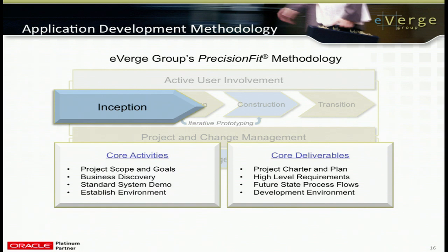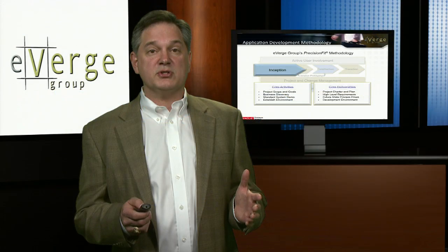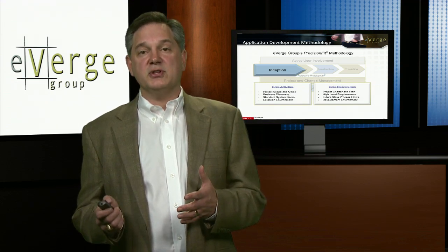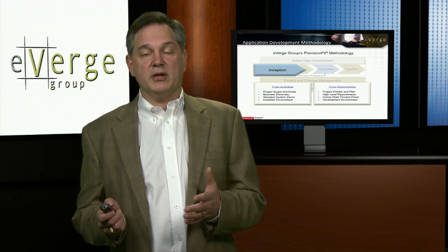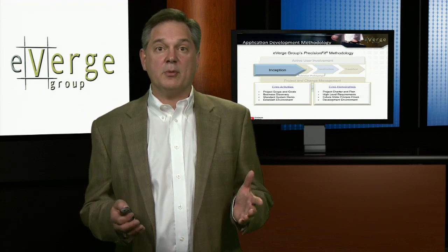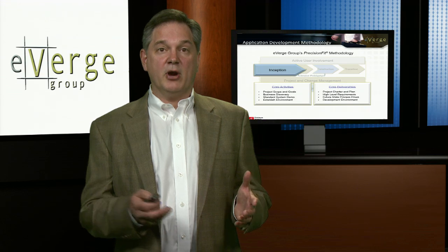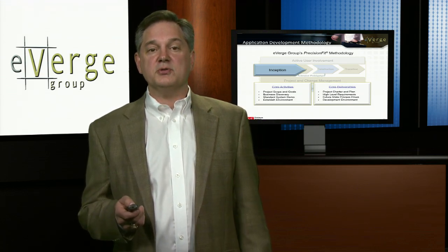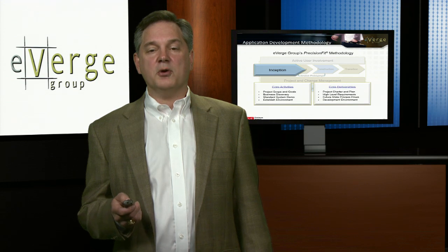How are we going to measure those business objectives so we can take a before and after picture and actually measure our success? Then we're doing discovery. We want to discover what they're doing now, not to the point that we're going to mimic it, but to the point where we understand the pain and why they're trying to change. We're going to start doing standard system demonstrations of our applications so they know what they bought so we can communicate with each other throughout the project. And of course, we're going to establish the environment, the development environments and the test and staging environments that we're going to work within. You can see that each of those core activities has a matching core set of deliverables